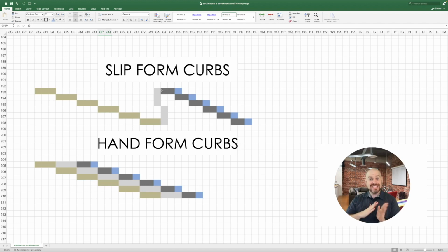So they decided to hand form the entire huge job site. And then we looked at, okay, well, asphalt paving, if it comes in, we could still leave that efficiency gap between paving to make sure it flows all the way through. But we had talked in that meeting that we had bought out way more mobilizations for paving because we were thinking we were going to do smaller chunks of paving.